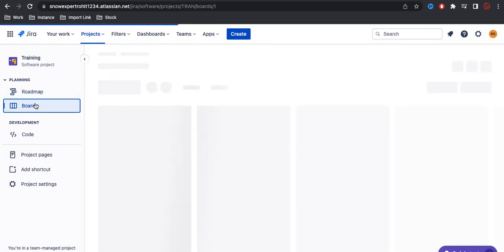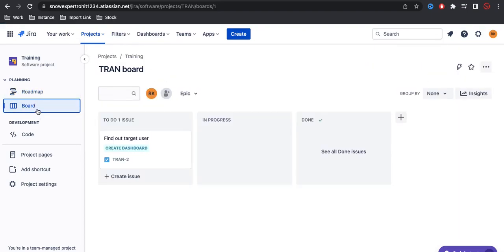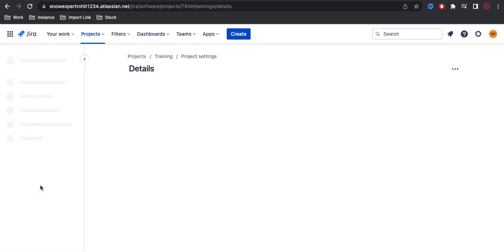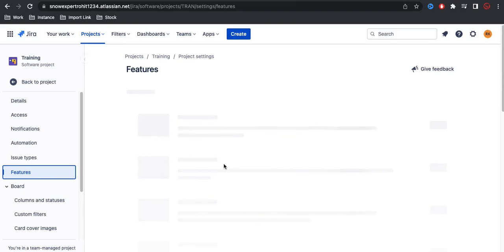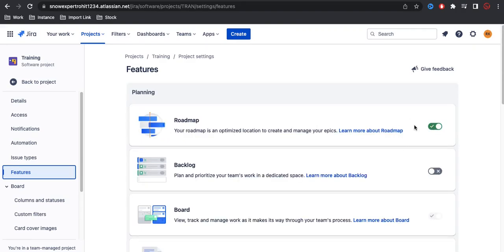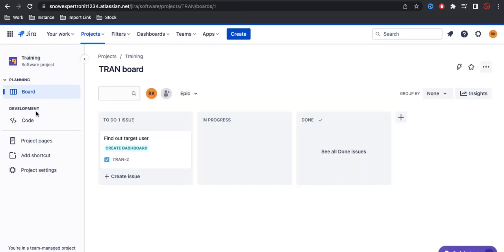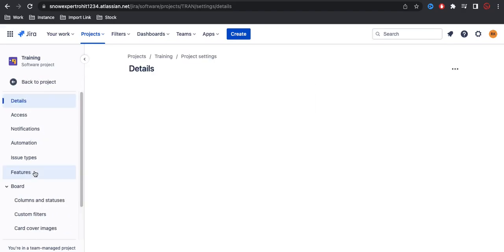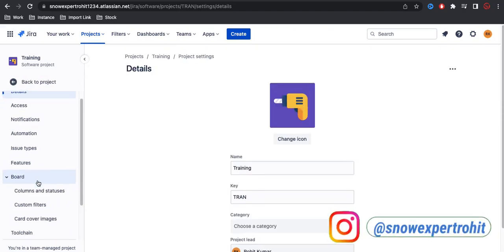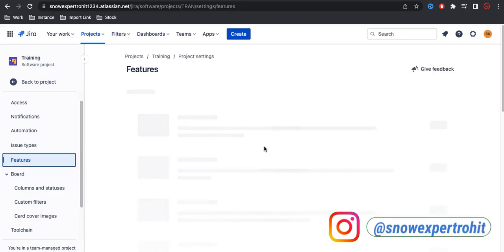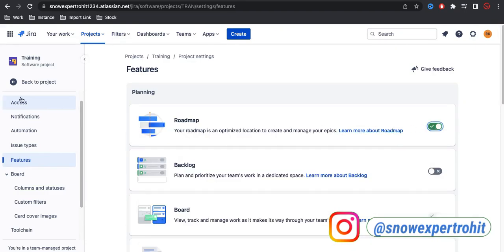If you go back to the main board and are not able to find the roadmap, you have to go to the project settings. Under the project settings, go to Features and make sure that roadmap is turned on. If it is turned off you will not be able to see the roadmap. So go to project settings, then Features, and turn on roadmap.